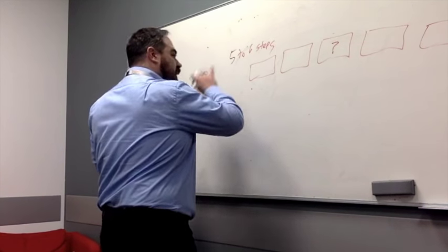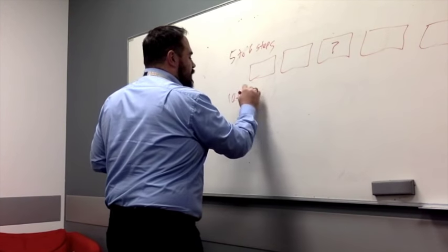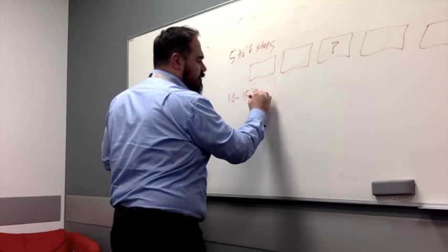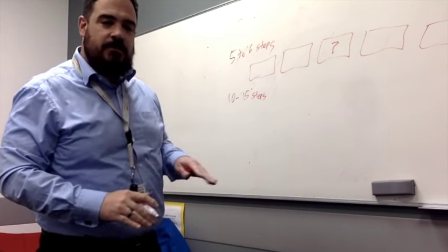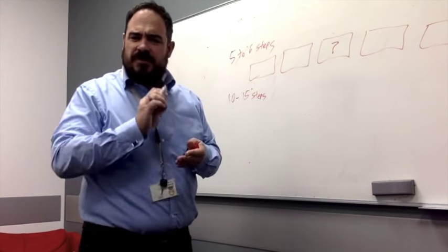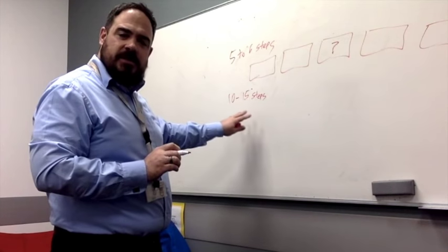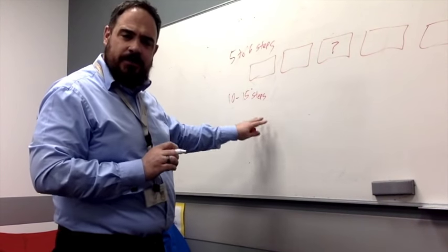We go now to level 2, a little bit deeper. Try to target about 10, 15 steps, maximum 20. We want to keep it at this level because we don't want to get into the work instruction. We don't want to go kind of in the prescriptive type of approach, right? We want to identify the value that each person is contributing, that each step is providing.